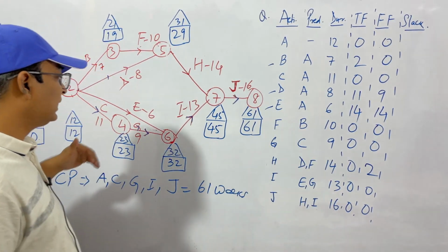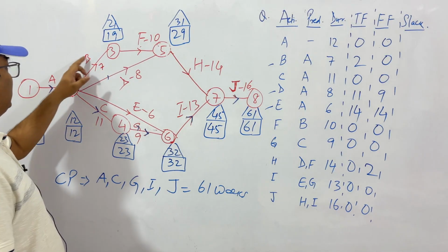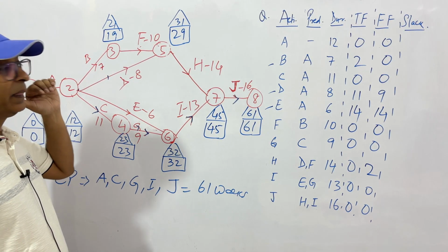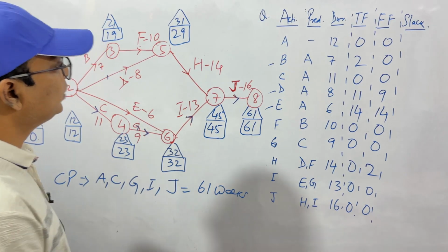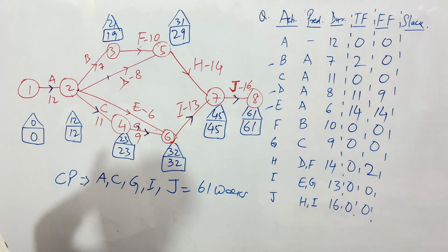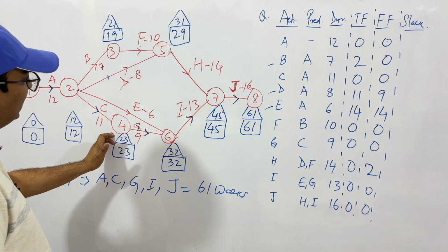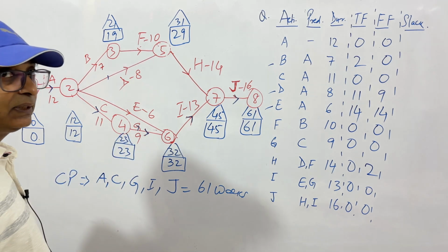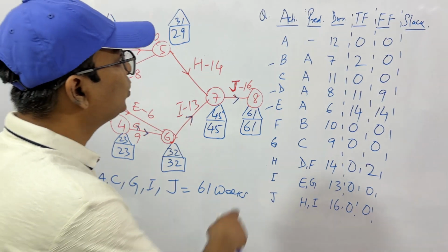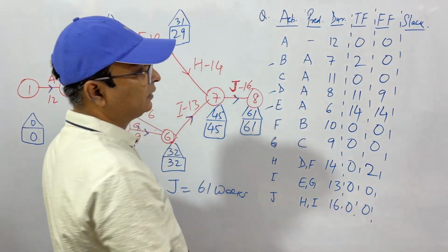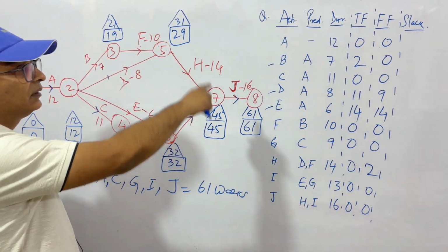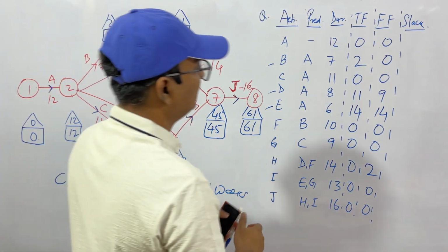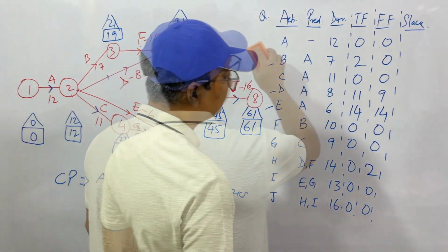Slack is how much an event can be delayed, not A and B, but events 1, 2, 4, 3. How much can this be delayed? Do we have any option to delay any event? That is, if this event is on the 23rd day, can we start it on the 25th day? That is the meaning of slack. It cannot be represented on the table expressing activities. We'll have to make a new table for events. Let's see, I'm now rubbing it.